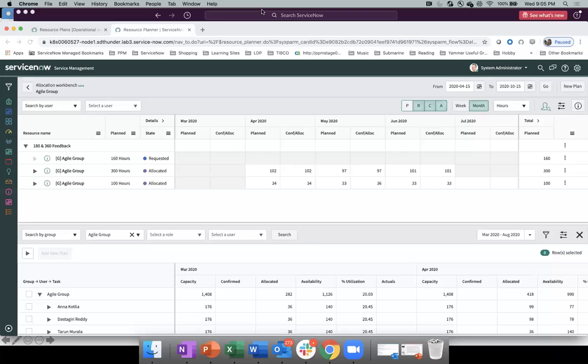What is the impact on my resourcing, and how does that affect the other projects? So that you end up having a very non-emotional conversation with the owners of the projects to say, okay, so we have prioritized project B ahead of all of those other ones, and it's going to use up this much resources. What is the impact to those other projects?